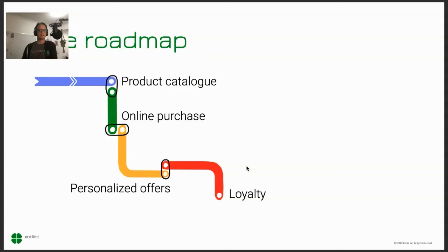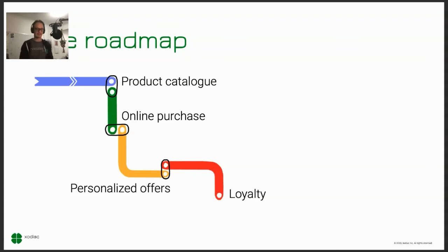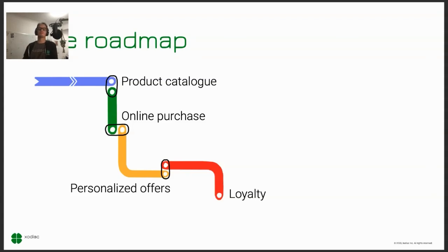Then come the more refined ideas. Personalized offers: once customers purchase online, we have data to figure out their preferences — maybe they like pasta — and send targeted promotions. Then loyalty: ensuring customers keep coming back. Some people think this is a valuable roadmap; others see problems. Comments mention a missing timeline, missing dependencies, no architectural runway, and a lot of complexity.